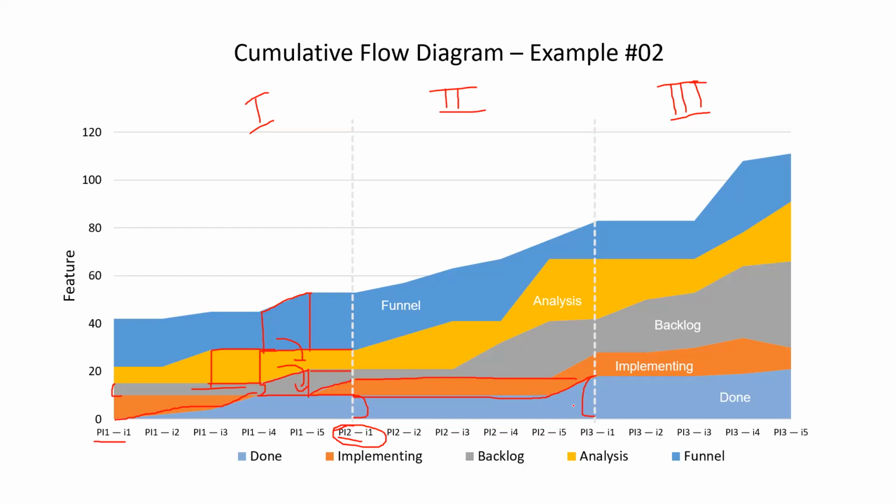You're getting the point? So if your graphs are looking like this, the cumulative flow diagram like section 2, so the done line is moving into progress only in the release sprint or just before the release.